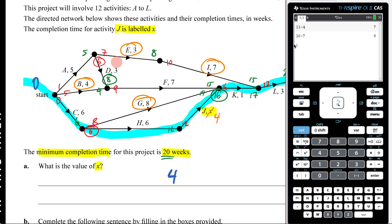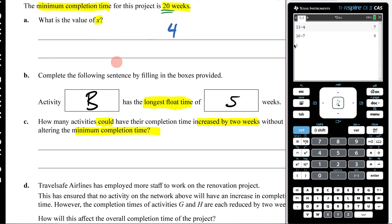And then, of course, everything on my critical path can't be bumped up. So it looks like it's one, two, three, four. So my answer here will be four.